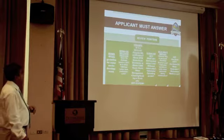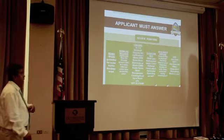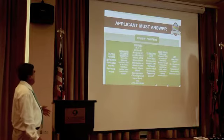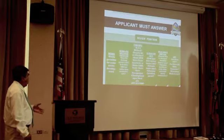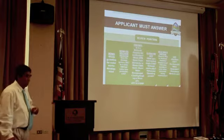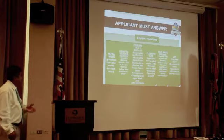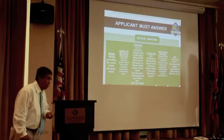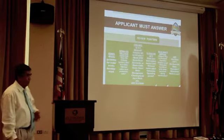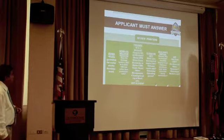And after that, we bring it to the Clean Water Act Water Pollution Control Program. These are the questions that we're asking. Is it a wetland that requires a 401 certification? Does it meet the DPW storm drain standard? Or does it meet the CNMI Guam Stormwater Management requirements when it comes to storm drainage? Do you have a clearing, grading, or stockpiling permit, and does this project require this permit? Or do you have an ESP, ECP, or BMPs included in your plan? And after that, you have to bring it to the Clean Air Program.